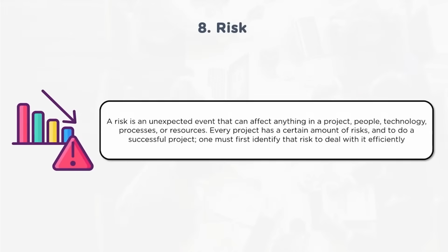So I need to ensure that by breaking down the product into multiple levels, by decomposing it, I can visualize the product very clearly, with what is there in detail. Once I have the details, I will articulate what that particular work breakdown element, product breakdown element is. Then I will look at what skills and capabilities are required for that product, and I will assign the resources accordingly. Once activities and resources are assigned, automatically this becomes a work breakdown structure.